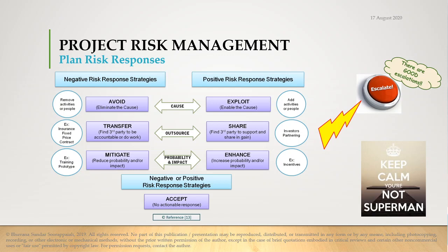It's a least priority risk, maybe. Yeah, least priority or least urgent risks. The watch list is also another list in which the risks will not be addressed unless some trigger happens. Then you will move those from the watch list to the main risk register.